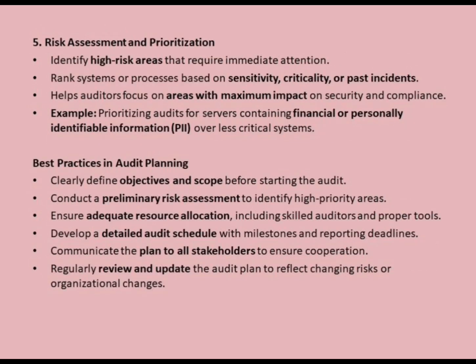5. Risk assessment and prioritization. Risk assessment and prioritization is a crucial step in audit planning that helps auditors focus on the most critical areas of an organization. This involves identifying systems, processes, or data that pose high security or compliance risks, and ranking them based on factors such as sensitivity, criticality, or past incidents. By prioritizing high-risk areas, auditors can allocate more attention and resources to areas where breaches or failures would have the maximum impact on the organization.